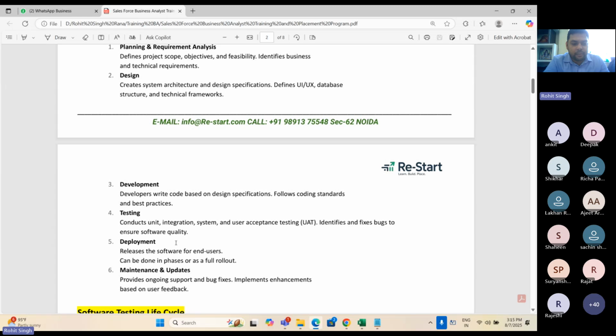Once that development is done, then we do the testing, manual testing and automation testing. Developers do the unit testing. Manual testers start with the functional testing with test cases and regression testing with regression packs. And once it is done, then pre-prod testing, or I would say stage environment testing, or system integration testing, and then finally user acceptance testing.